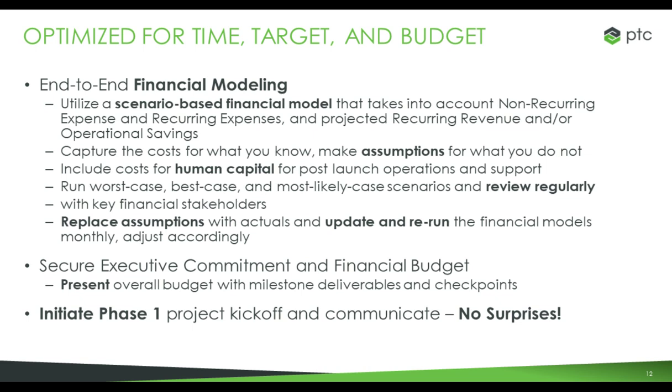If you don't know what your costs are going to be, both non-recurring and recurring expenses, use assumptions. There are market assumptions out there. We use assumptions based on feedback of our projects as a whole, and then we eliminate those assumptions as we move forward with the customer and continue to fine-tune our financial models on behalf of the customer.